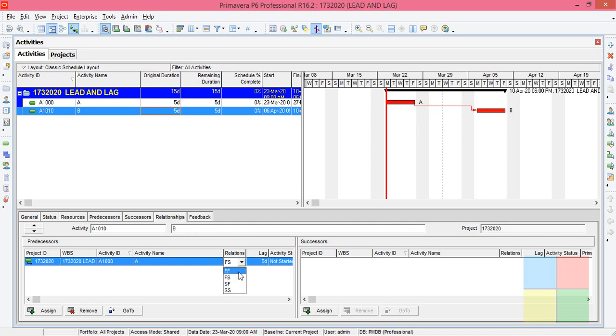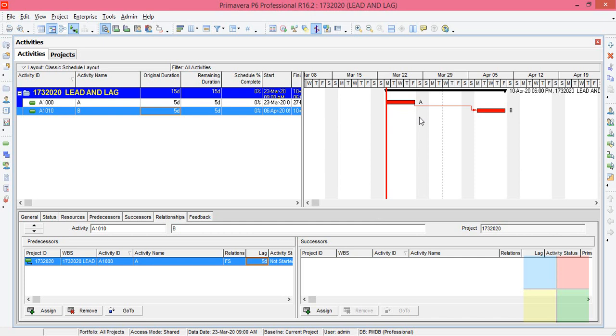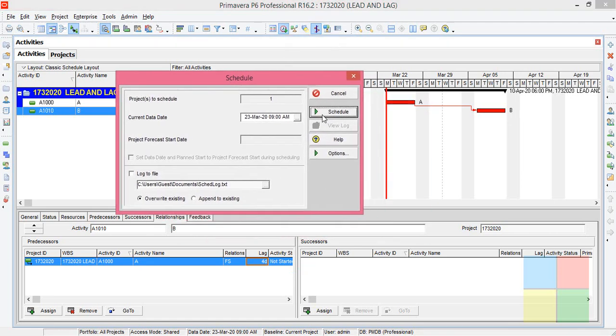Got it, right? You need to assign one of the relationships between two activities, then comes the lead and lag. They are optional. So if you want to have a finish to start relationship between two activities and at the same time you want a gap of two days, three days, one day like that, then you need to use a lag. So in this case, I use five day delay between two activities. They still have the finish to start relationship. Okay, so if I change it to four days and I'll update it using the schedule button.